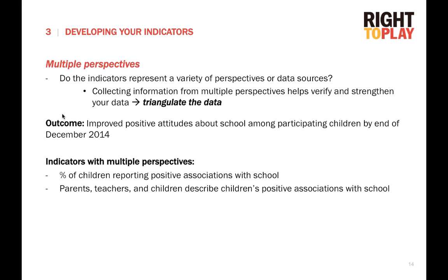You want to have indicators that represent a variety of different perspectives. And if you collect information from different people and different data sources, it helps verify and strengthen your data. This is known as triangulating the data.